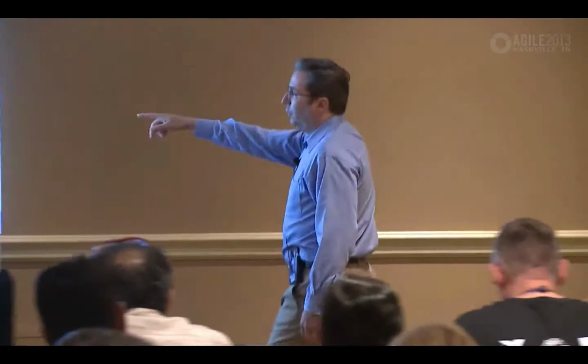All right, organize the teams to validate important assumptions first. Think about how you structured the teams and ask yourself the following question. If I use that team structure, does it help me validate important information quickly, or does it defer the validation of important information until late? The economics favor fast feedback. That which I learn early is more valuable to me than that which I learn late, because I can act on it sooner. Take, for example, what if we had 3 teams?